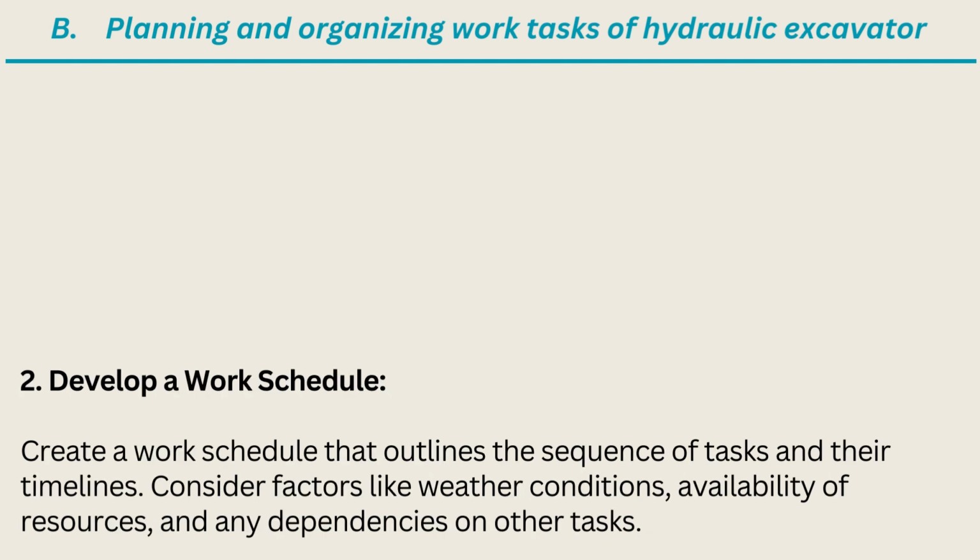2. Develop a work schedule. Create a work schedule that outlines the sequence of tasks and their timelines. Consider factors like weather conditions, availability of resources, and any dependencies on other tasks.